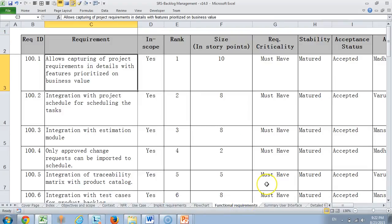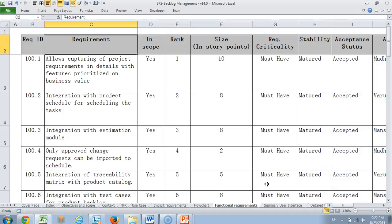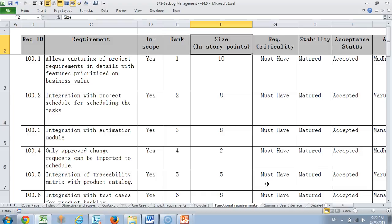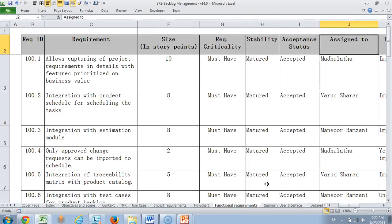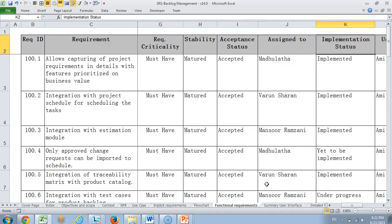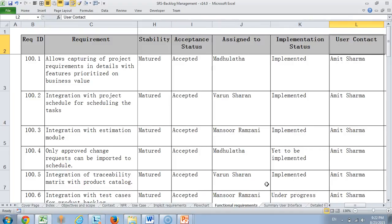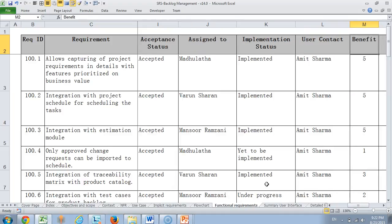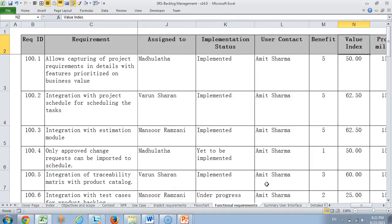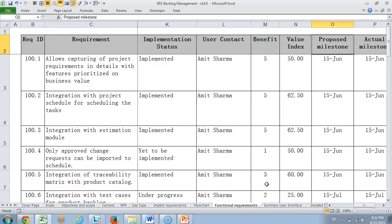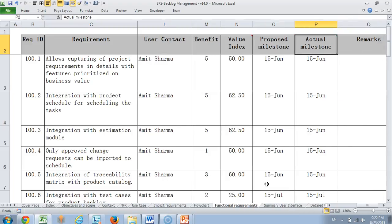Then we come to functional requirements where all the requirements that are being implemented in this system or module have been explained. The column headings are like whether it is in scope, what is the rank of the requirement, what is the size in story points because we follow agile methodology, whether the requirement has a very high criticality, is it stable, whether it is accepted and to whom is it assigned to, what is the implementation status, who is the user contact, what is the benefit of the requirement and the value index. The value index basically is a calculation using benefit and the size. Then what is the proposed milestone for the requirement and what is the actual milestone for the requirement. This is where we describe all the features of the product.